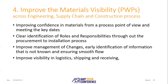The fourth aspect is improving materials visibility. This is where the PWP report catalogs everything right from when engineering raises an MR (material requisition), all the way through procurement putting a purchase order, transportation logistics, site warehousing, and receiving — all presented in a clear picture by EWP. CII already took up this specific topic, and Bill O'Brien, who will be participating in the conference, will be bringing up materials visibility in the plenary.